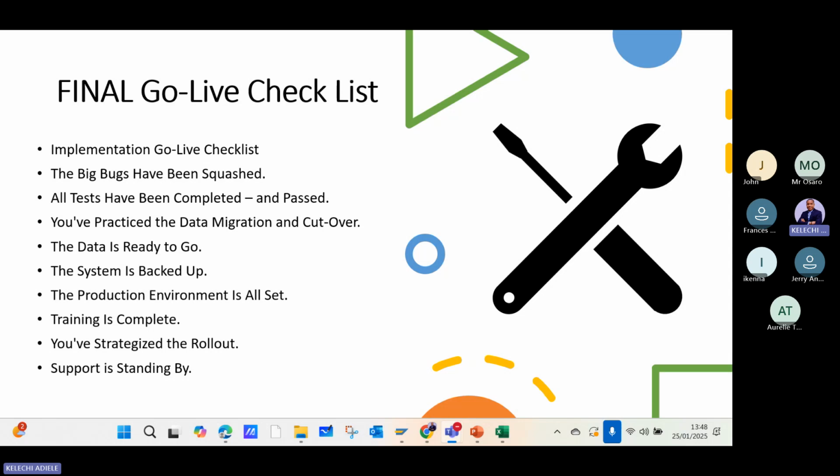There's a project I did some years ago. It was the same thing. We went live in January, but it took us some time to catch up. So we had to keep posting backlog to catch up from where they were, before we finally migrated into the system. So yes, it's a good question. That's what happens really. If you have selected a cutover date, you would have to run through very fast. Let's say that we have said cutover is the first week of January.